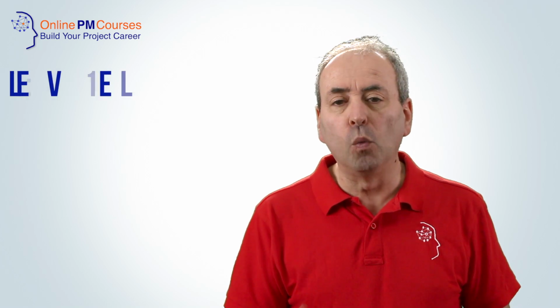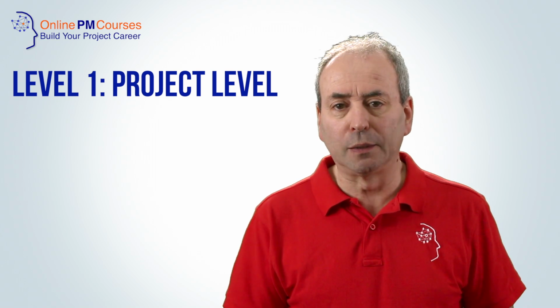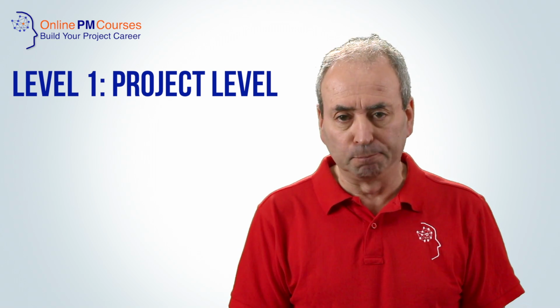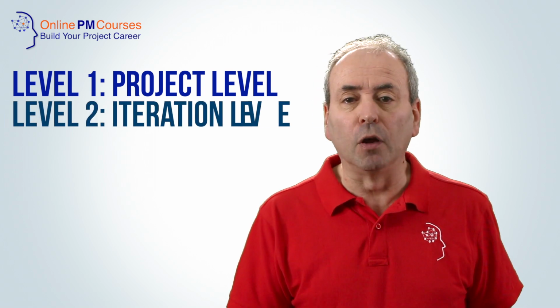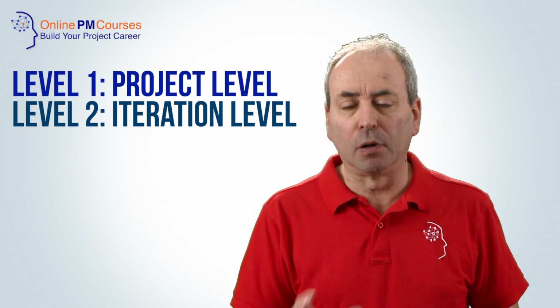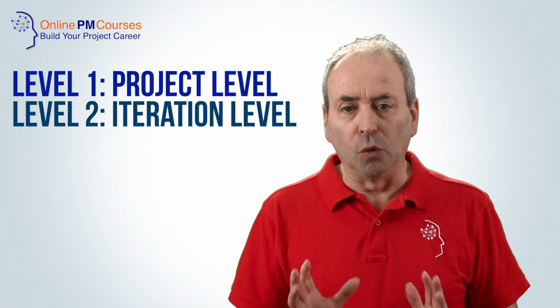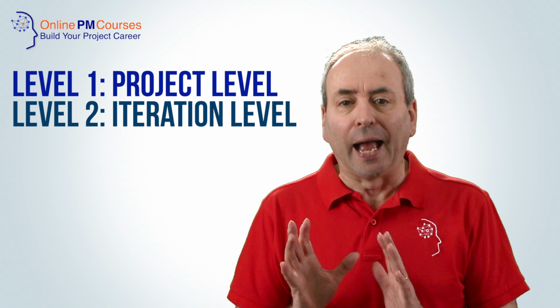Whilst the basic process of project management is the same in predictive and in agile projects, we tend to apply the risk management process at two distinct levels. Level 1 is the project level. For this, we create an overarching risk management framework for the whole project. Level 2 is the level of the iteration or sprint. Risk management becomes a process that happens within each iteration, so that each iteration or sprint assesses and manages its own risks.